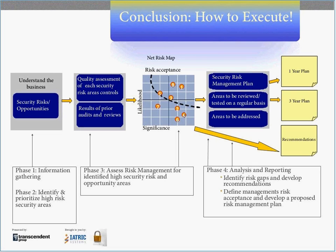Phase three entails assessing the quality of controls for the risk items and generating a net risk map, which will be used in the last phase of the reporting. It's important for management to identify their risk acceptance level, and that should also be formally documented. A risk management plan should be generated for addressing the risk items remaining above the risk acceptance level, along with further reducing other risks.